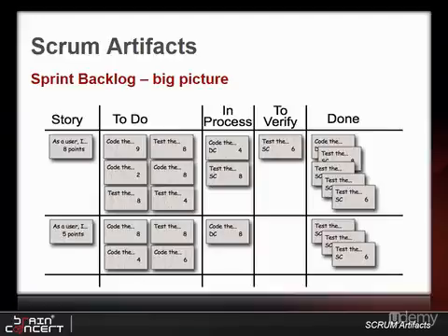Just remember this: tasks in agile projects should take a day or less to complete for 2 reasons. The first reason is pure basic psychology. People are motivated to get to the finish line. If you have a task that you know you can complete quickly, you are more likely to finish it on time, just to check it off your to-do list.